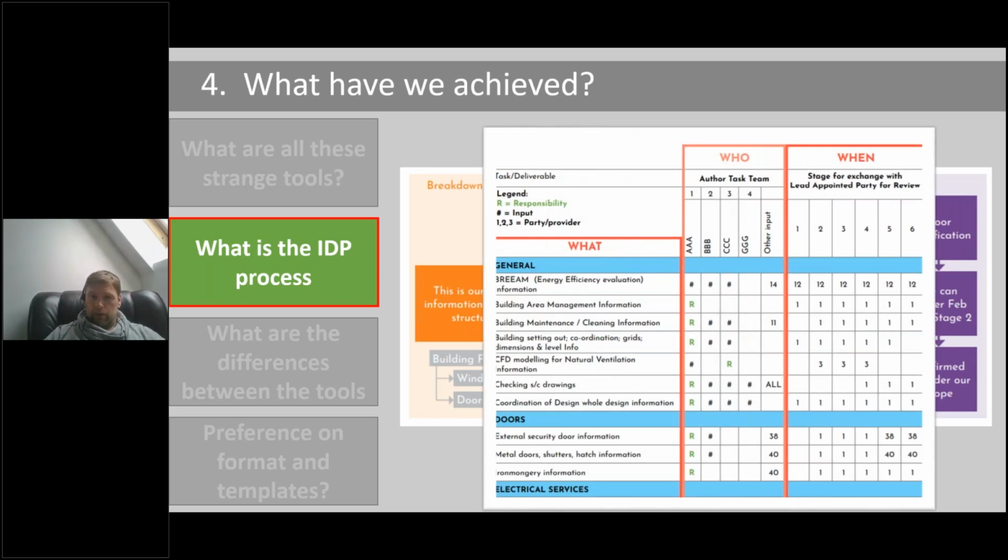This example, which is provided in the guidance, shows an old responsibility matrix that I actually took from a 2008 project, which I helped compile. It assigns responsibilities for design elements, but also statutory compliance obligations. Looks like there's some planning management responsibilities, BRIAM, overall responsible for coordination. So you're going into that granularity of who's responsible for what. And you have to define these things for scope of services when you're compiling a delivery team, because you need to be clear on who's doing what.